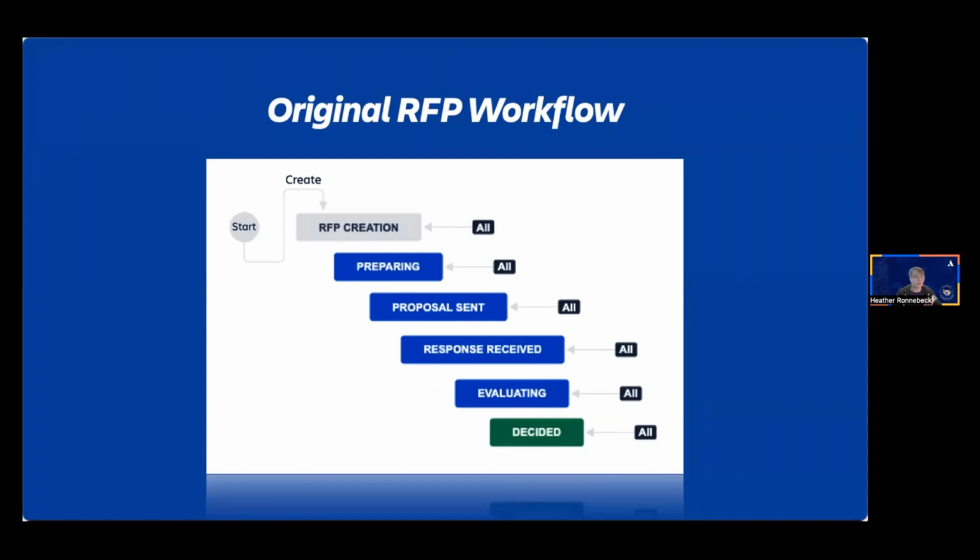In this use case, we're going to have to modify the proposal sent status and completely redo all of these different transitions. The any-to-any transition model, again, can break our automations. Also, if that's not enough, I don't know about you guys, but most finance teams I deal with have more linear workflows and processes. So this workflow is not going to work for them.